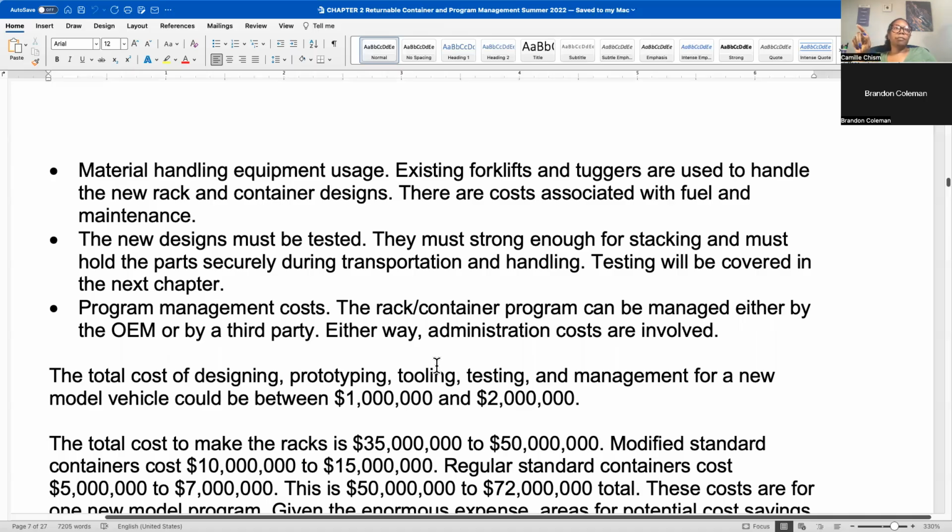Then we had a repair company come in, and they would repair them on site if it was easily fixed, because they couldn't have welding equipment on site. If they required welding, they would take them to their facility, fix them, and bring them back. And then we had to keep track of how many were in the repair loop, because we never wanted to run short on racks. That would be an example of managing the repair program.